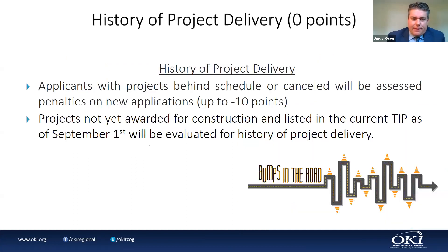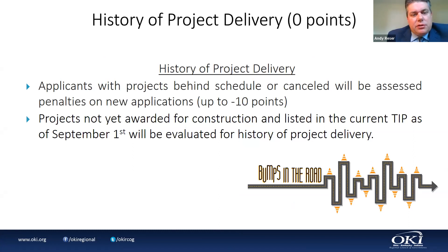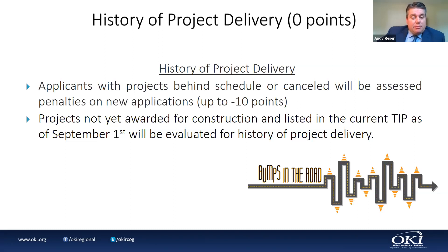History of project delivery: applicants with projects behind schedule or canceled will be assessed penalties on new applications. The maximum penalty is minus 10 points. This is a snapshot of OKI-funded projects in the TIP on September 1st. One project slipping to a later year: minus three points. Two or more projects slipping: minus five points. A canceled project: minus 10 points.